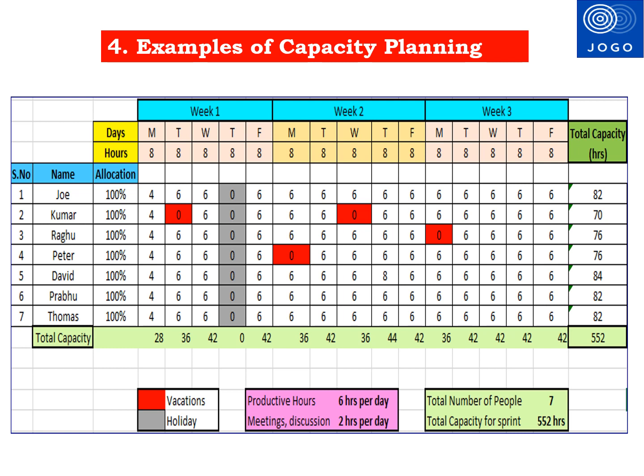You can see an example of the Capacity Planning Excel template in this slide. As per this example, the sprint duration is 3 weeks, shown as week 1, week 2, and week 3 in the top row. 15 working days are considered for the 3-week sprint, excluding Saturdays and Sundays — meaning working days are Monday to Friday only. The second column has team member names: Joe, Kumar, Ragu, etc. Standard working duration is 8 hours per day, mentioned in the third row.